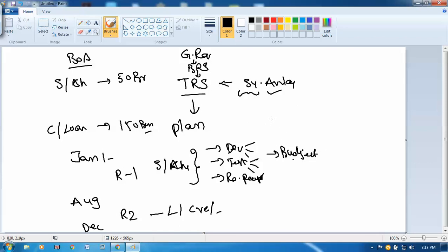I'm planning like this. In the first month, January, complete documentation. So far we discussed the BRS document, TRS document, project plan document and design document, different documents are there, right? So I'm going to finish all the documentation in 1 month, January. We are going to start coding in February, March and April, 3 months for coding. May for complete testing.